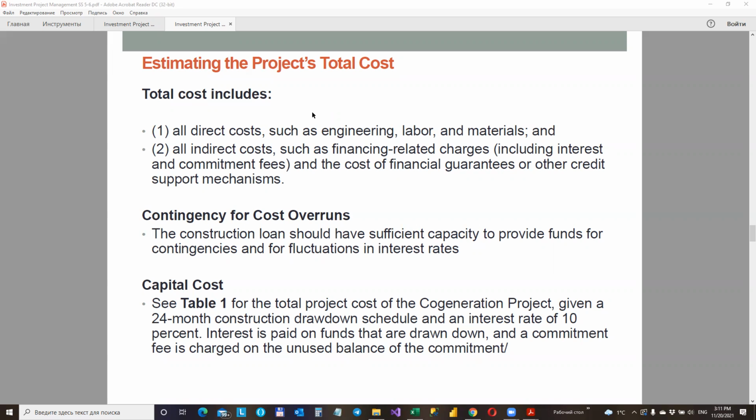In the case of the cogeneration project, the engineering firm and the local utility, the two owners of the cogeneration corporation, have agreed to pay various pre-construction costs, mainly the fees for securing the many permits that the cogeneration project will need to have before lenders will advance any construction funds. These pre-construction costs amount to $3 million. So we have a first input at hand. Then, the engineering firm and local utility contributed these permits to the project in return for equity in the cogeneration company.